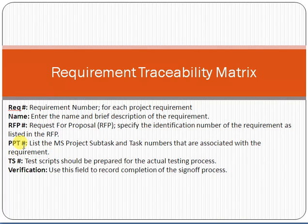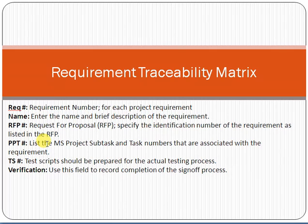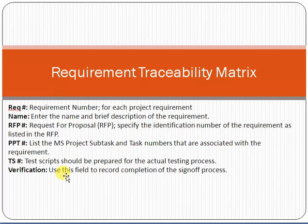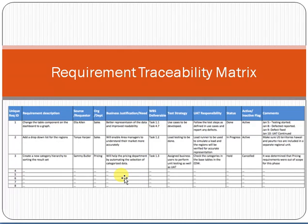Next is the PPT Number — PPT stands for Project Plan Task. As per the MS Project plan, each requirement has a reference task number, such as 42 or 52. Then there is the Test Script field — since this deliverable will be tested, the test script number is recorded here. The Verification field is used to record completion of the sign-off process, confirming that after delivering the requirement to the customer, it has been formally signed off.